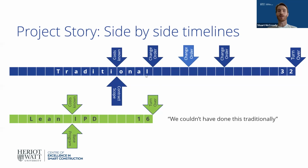I think one will particularly be the buy-in of the ownership structure. So not having a lot of experience in the IPD model will make it a little bit more difficult. So for example, we had a very well bought in owner through Francis, who is very well versed in the IPD process, right? And seeing it work, going through that, you really have to believe in that. And you also have to get complete owner buy-in, right? Like we needed Francis to be at the weekly meetings that we had to make decisions so they could be made within the right time frame so we could proceed as quickly as possible, right? That would be my biggest, I guess, implementation issue, is potentially getting that owner buy-in.